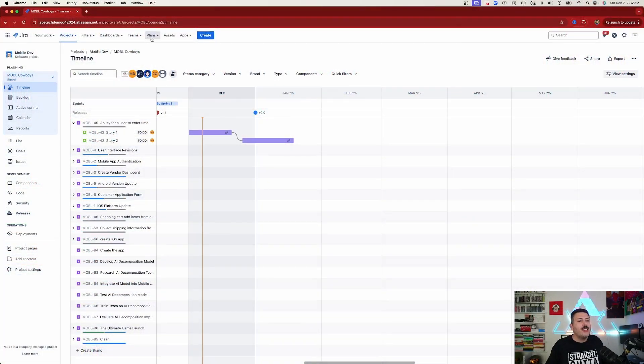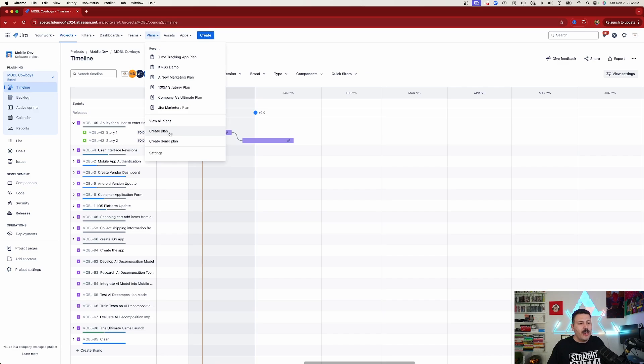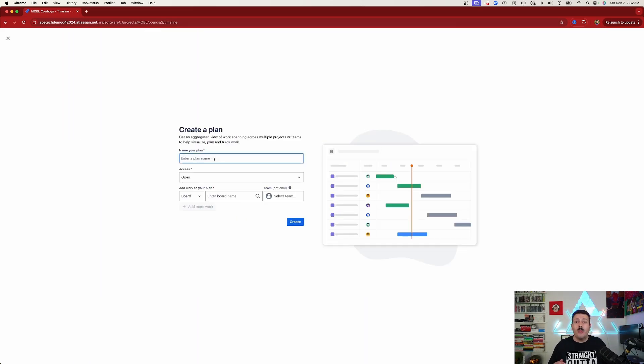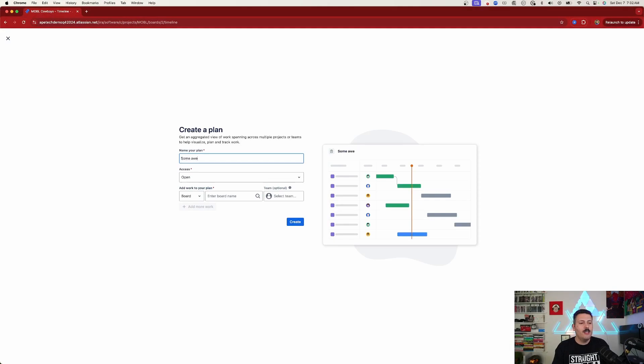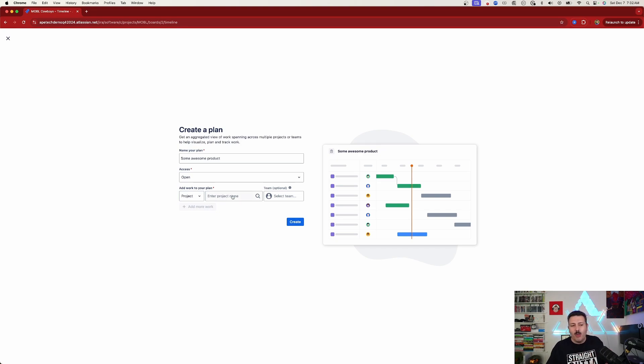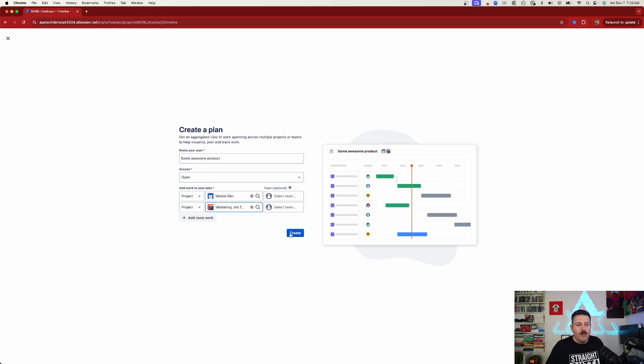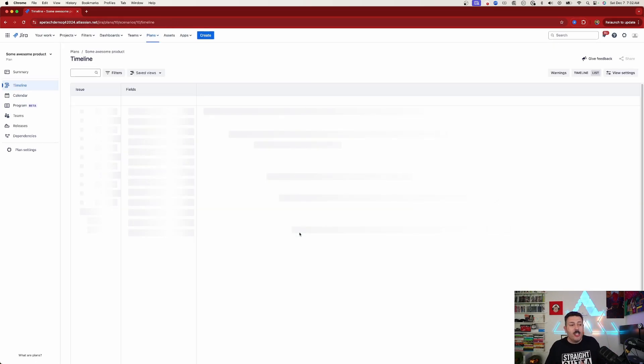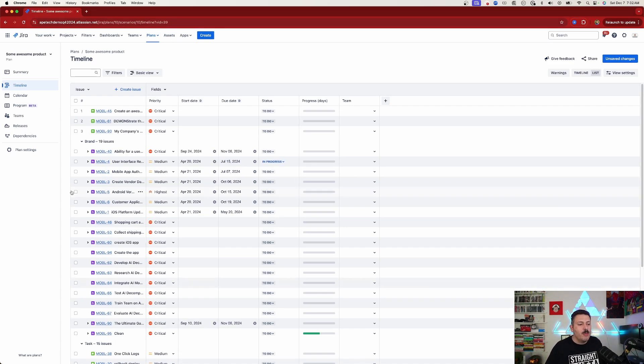To create a Jira Advanced Roadmap, go to the Plans section in Jira and click Create Plan, then give it a name. Think bigger than just your team — name it after the product you're building, something like 'Some Awesome Product.' Then pull in your data sources; I recommend bringing in projects, though boards work as well. Bring in one project, then another, and once you have them, hit Create. Now you'll have issues from multiple projects, identifiable by their project keys.